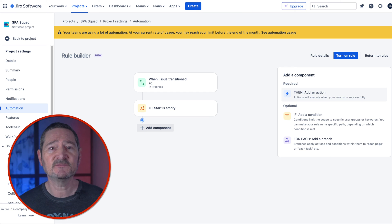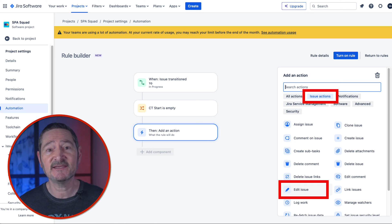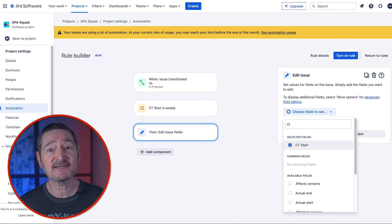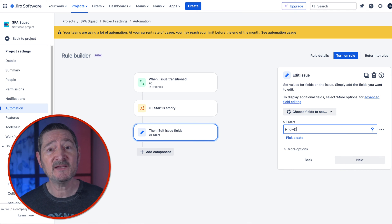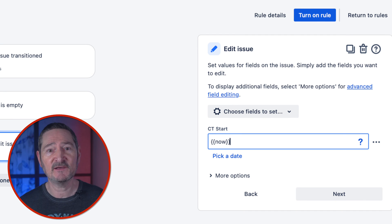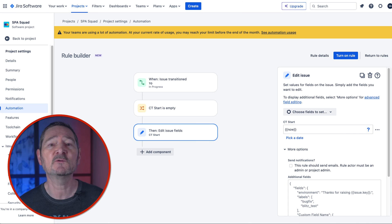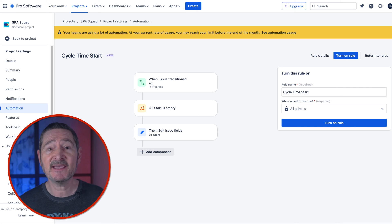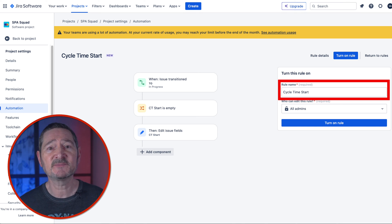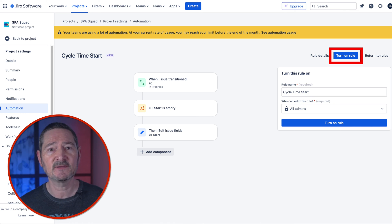And finally we're going to add a Then action. Click Then Add an Action, select Issue Actions, then select Edit Issue. In the Choose Fields to Set drop-down, select our custom field CT Start. Once selected you'll see a box labeled CT Start — in this box type `{{now}}`. This is a Jira smart value that will put the current date into our custom field. Click on More Options and deselect Send Notifications as we don't want this rule to send any. Then select Next and name your rule — I called mine Cycle Time Start, and allow all admins to edit. Very importantly, don't forget to click Turn On Rule as the final step. The rule is now saved.